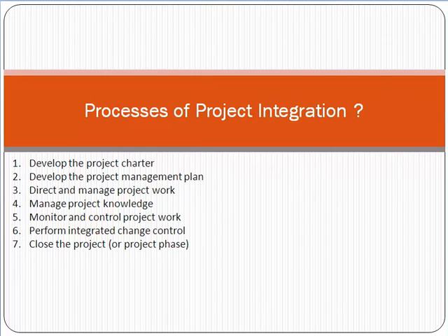Friend, as per the PMBOK, the process of project integration consists of 7 processes. First of all, you have to develop the project charter, then develop the project management plan, direct and manage project work, manage project knowledge, monitor and control project work, perform integrated change control, and close the project or project phase. These are the 7 processes defined in the PMBOK guide.